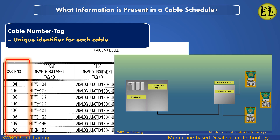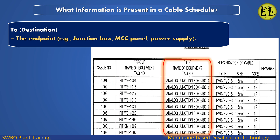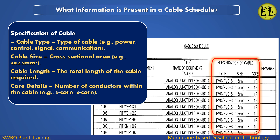What information is present in a cable schedule? Cable number or tag — a unique identifier for each cable. From source: the starting point, for example a field instrument, motor, or sensor. To destination: the end point, for example a junction box, MCC panel, or power supply. Specification of cable: cable type, for example power, control, signal, or communication cable.